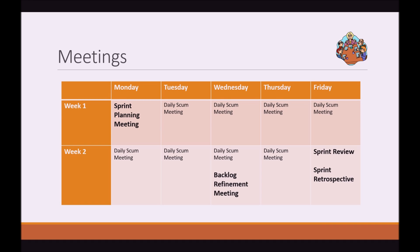Here's a sample calendar for a two-week sprint showing what it would look like in terms of meetings. On Monday we have the sprint planning meeting. Every day after that we have daily Scrum meetings. On Wednesday you can have your backlog refinement meeting, and on Friday you can have the sprint review and sprint retrospective. At the end of the series you'll fully understand what each meeting means, and this calendar will make a lot more sense.